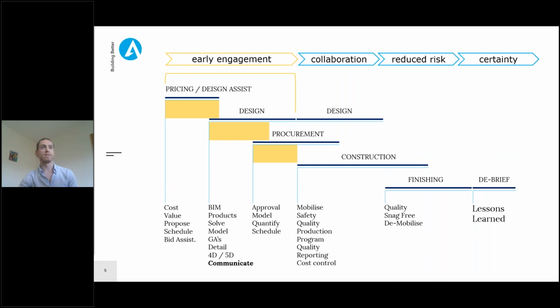In keeping with lean principles and best practice, early contractor involvement is the optimum use of time at the pre-construction stage to plan a project before it commences on site. The optimum duration of the early involvement phase can differ from project to project depending on the scale and complexity. As an example, on data center projects, we have seen this vary from 3 to 6 months for specialist trade contracts that are procured through conventional means, and up to 12 months on some IPD projects, where we take more of a leading role in terms of IPD, or integrated project development.